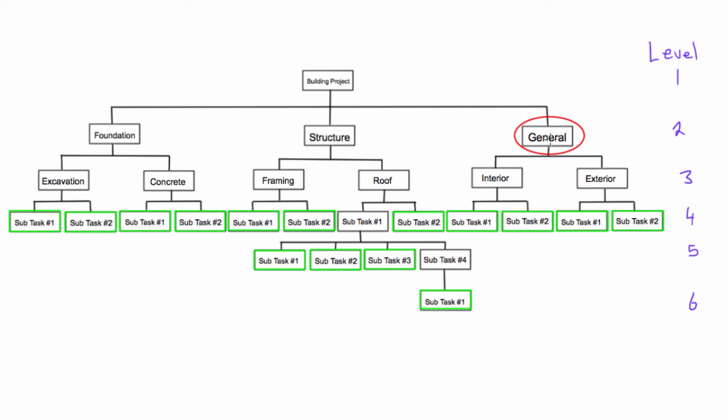General is extremely vague wording, so try to be more particular than that. And if you find a more specific set of words, you might have to reorganize the subtasks that come after it. That's fine, because if someone looks at foundation or structure, they have a pretty good idea of what you're talking about.